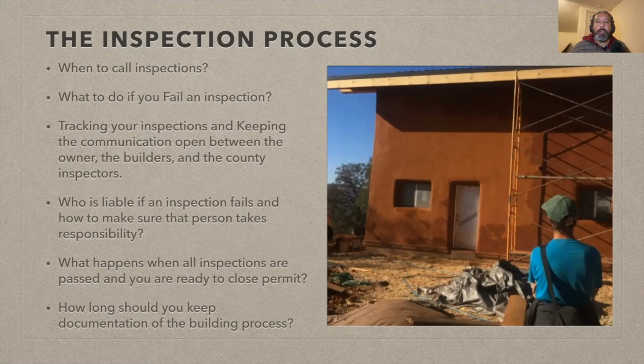It's important to have contracts between you and your subcontractors, you and the natural builder, you and the builder, you and the general, so that it's spelled out clearly what happens if an inspection fails, who's responsible for what, where the liability lands in terms of who's paying for the corrections, who's paying for additional materials, who's paying for the time to fix it. Important to read that in the contract. If you don't see it in the contract, you need to ask for it to be in the contract. Very important. Or you add it yourself.